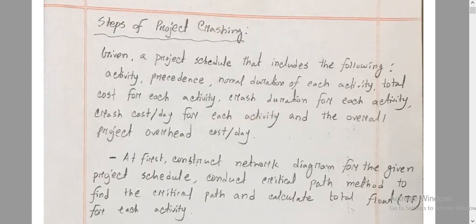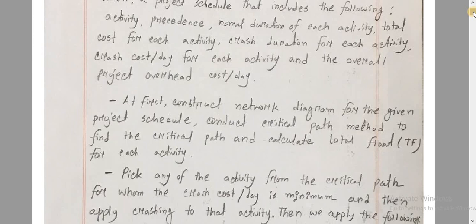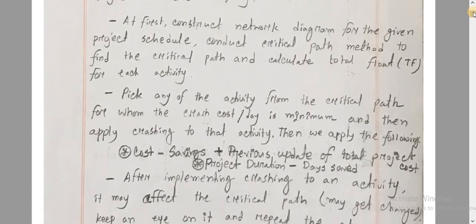The first step: construct a network diagram for the given project schedule. Then conduct the critical path method to find the critical path and calculate the total float for each activity. So, project crashing continues to find the critical path.